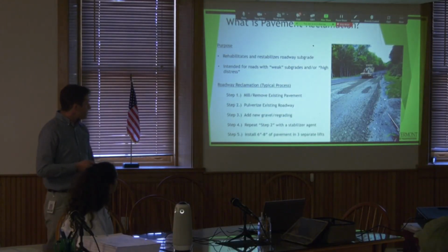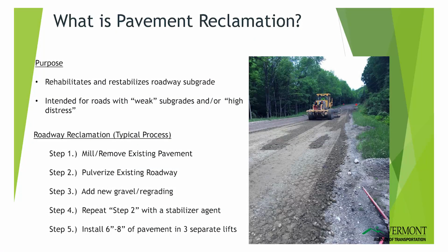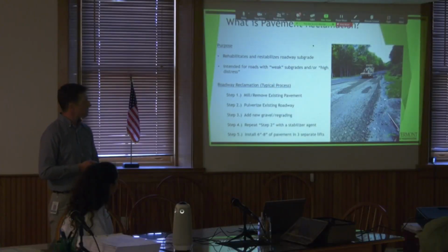So let me talk to everybody about what pavement reclaim is. It's basically the best treatment that we have in our toolbox to address a road that has been really neglected over time, or has really weak subbases. Whenever we get into reconstruction, it triggers permits right away and long planning processes. This is the best thing that we can do without having to go through years of permitting. And it just resets all the distresses.